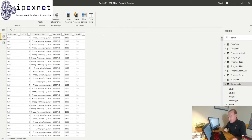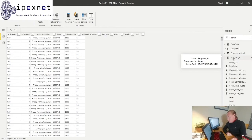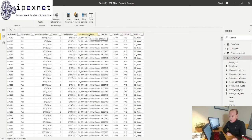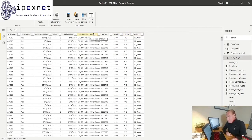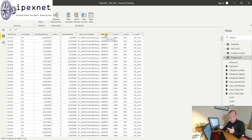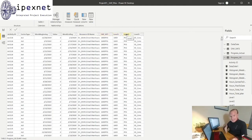Because if you go to my progress table here, I'm actually tracking my progress to three plus another one - so it's actually three plus one. And how do I link it? Well I need to create an SAP key in my progress data so I can link my timesheets to my progress. Here I'm only linking on a combination of level one, level two, in the exact same way I have with my timesheets.